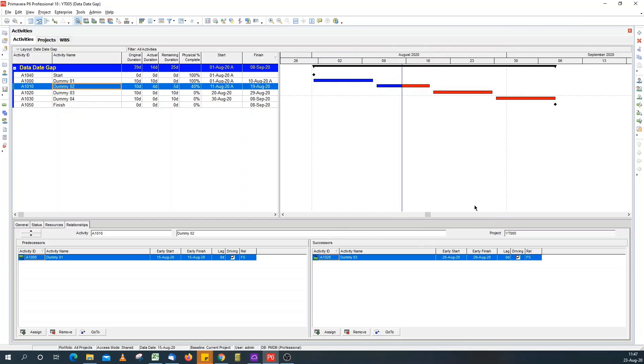And like I said, this only happens when you're not using a 24-hour day calendar. If it's a 24-hour day calendar, the 0100 hours won't make a difference. It's the start time for a 24-hour calendar anyway. There you go. This is a quick tip. I hope you enjoyed it. Take care. See you next time.